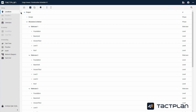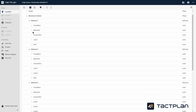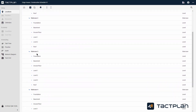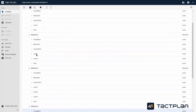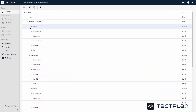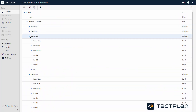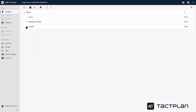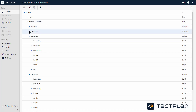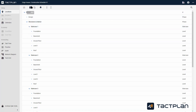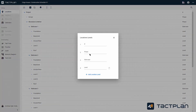In Locations, you set up the locations for the schedule. You can add location levels, and you can add locations and sub-locations.